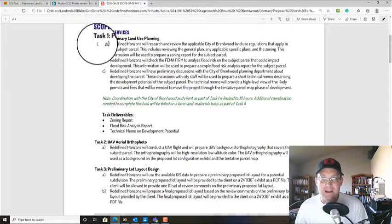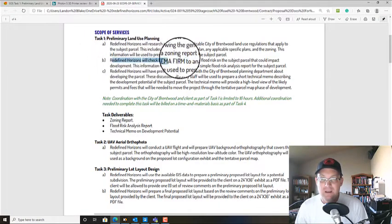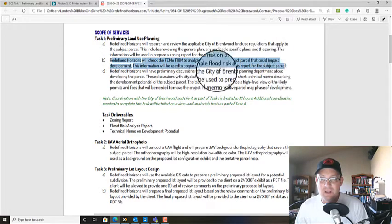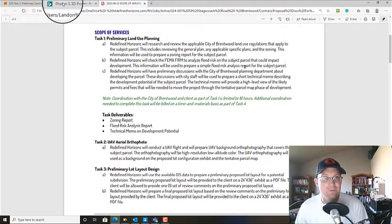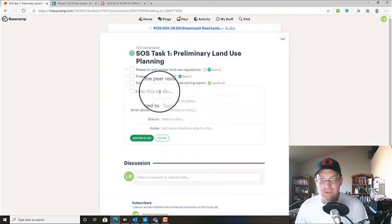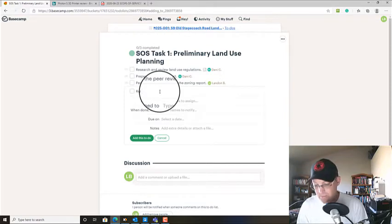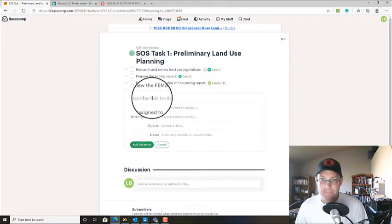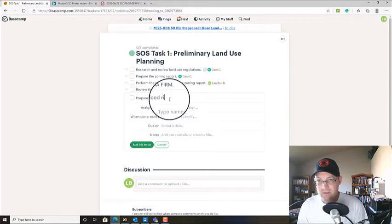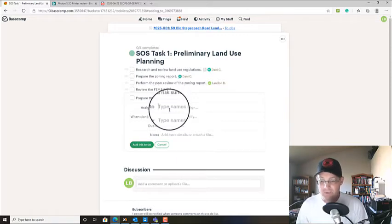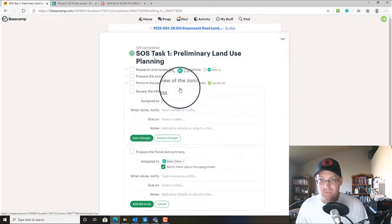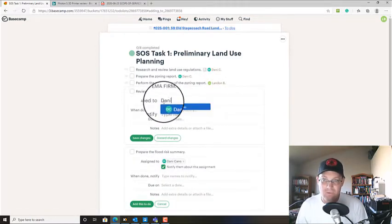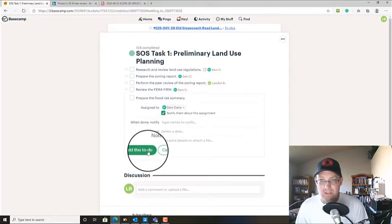That covers 1A. On 1B, we need to check the FEMA flood zone and prepare a flood risk analysis report. So we're going to make that into two tasks. Review the FEMA firm. And we're going to prepare the flood risk summary. And we're going to give both of these to Danny.